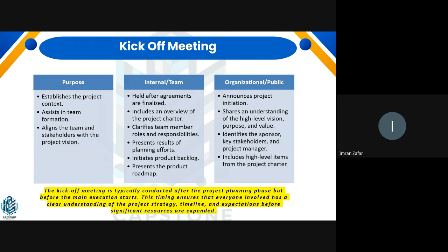So for that scope, who are we going to talk to? We are going to talk to our stakeholders about that. We need to gather their requirements, their expectations, and for that we need to identify all the stakeholders, as many stakeholders as we can, because once we identify the stakeholders, we assess our stakeholders, only then can we gather requirements from them.